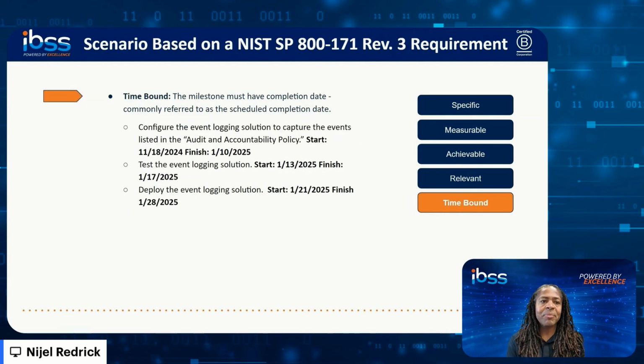Continuing with additional milestones. After the funding has been allocated and the event logging solution or tool has been purchased, we set aside a couple of months to actually configure the solution, because remember that configuration must comply with policy. So this is not an overnight type of activity. After the solution is configured, we set aside about 1 work week to test the solution, and then about another work week to actually deploy it into the enterprise environment.